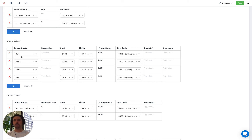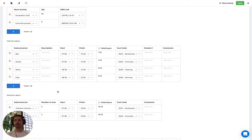It's going to look at this column and, because we've got a drop down list for the person's name, it's actually going to associate this quantity with that person's name and also with the cost code drop down. Pretty much any drop down menus you have in your table — the values selected in those drop downs for that row will be associated with that quantity. So 7.5 will be associated with Ben, 7.5 with Daniel, 6 with Mario, 6.5 with Felix, and so on for as many rows as you create. It's really important to set up your template this way so that we can extract that information and plot it using those quantity charts.